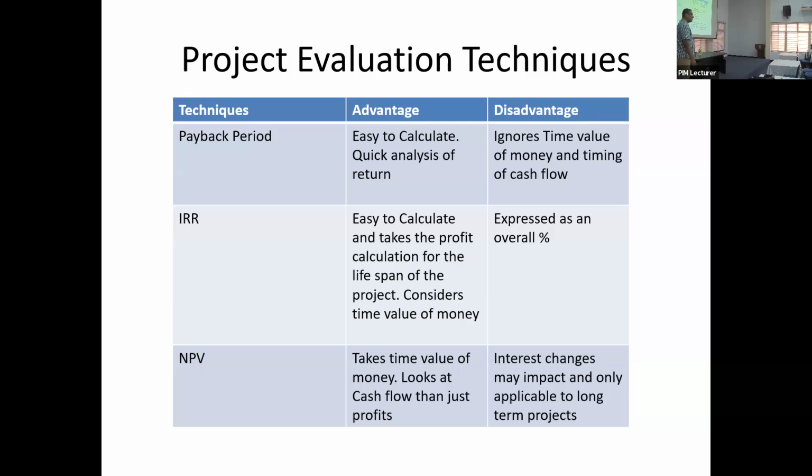How would you know? Just put a number. So these are some of the challenges you face. Now, for example, even income versus outflow, you take the same value. No salary increase, nothing increases. So you need to be careful when you are doing an NPV in a project, because every single factor changes.